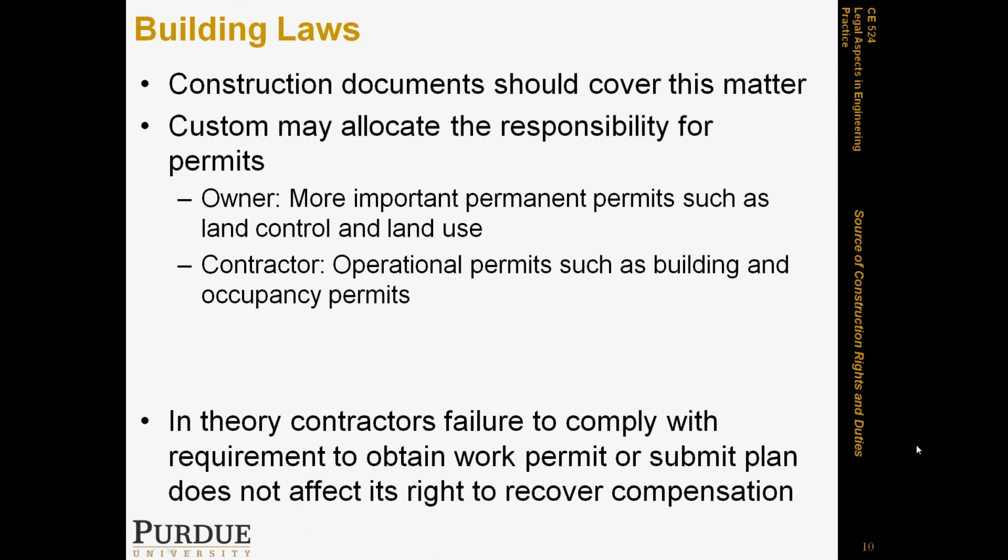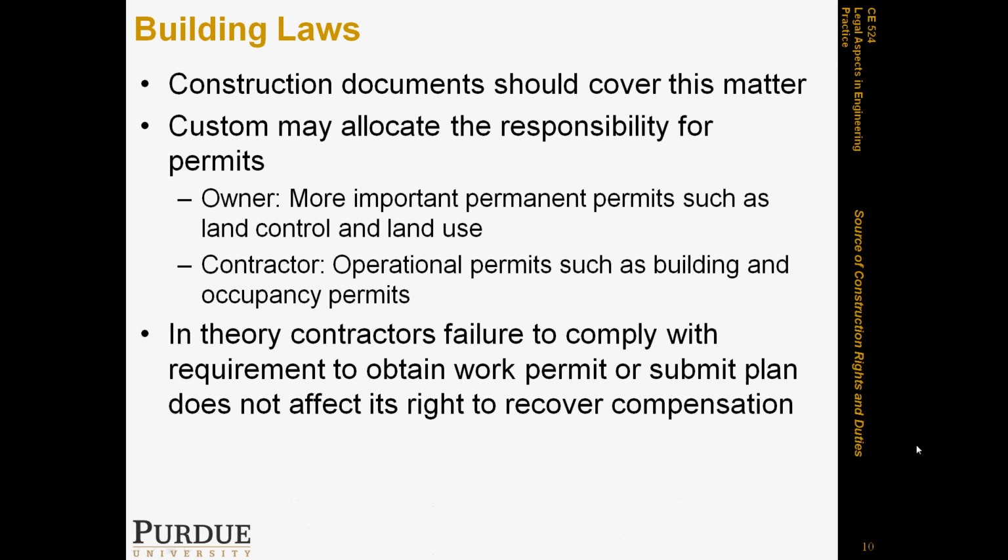In general, contractors who fail to comply with the requirements, to obtain a work permit or submit a plan, basically that does not affect their right to compensation.